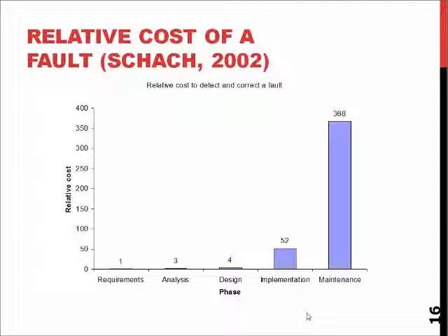multiplier for the costs, simply because you have already written the software which uses the faulty requirement, or you have to fix the fault by altering the code or existing components. And that's more or less peanuts compared to what you would have to pay if you have to fix one fault from software that's already out, that's already launched, and that's already in use somewhere.